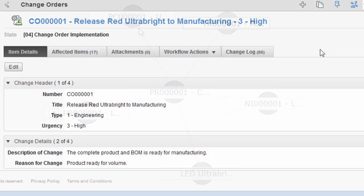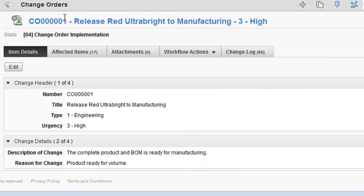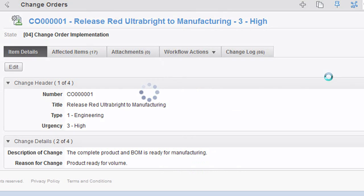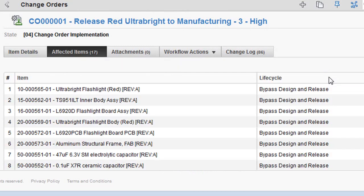In the change order environment, for instance, when you request a change, you'll notice that all the other items that will be affected by your change are also queried, listed, and displayed.